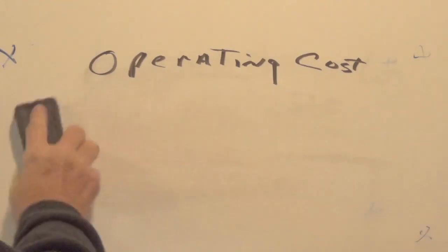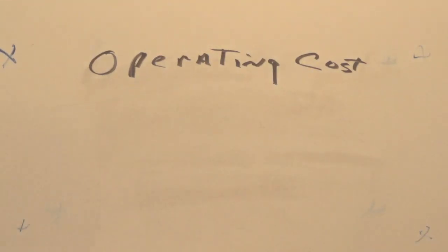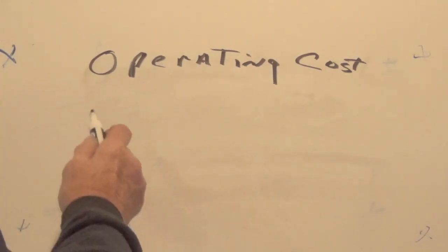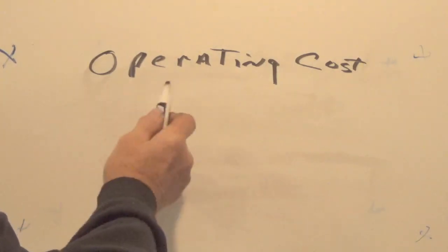Let's say I get a load of 2x4s, and this is a perfect example. Let's say I buy 50,000 2x4s. I have all these 2x4s and they're going to go to 20 or 30 or 40 different jobs. I need to keep track of that, and I don't want to get into this too much at the moment, but you keep track of where they go by giving a job a number.